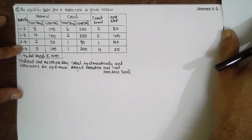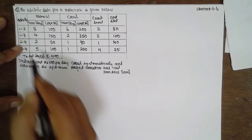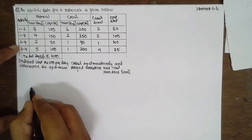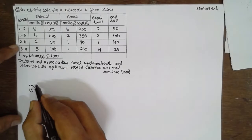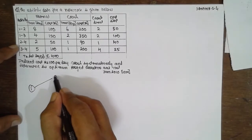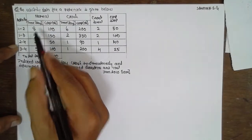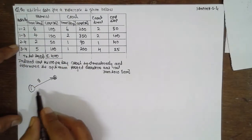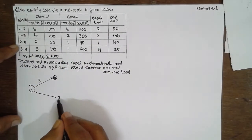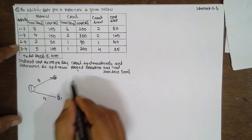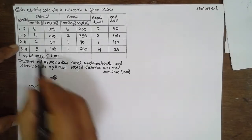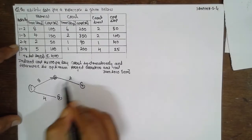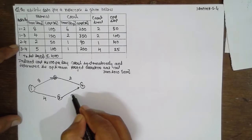Now we are going to draw the network diagram based on the activity. Activity 1 to 2, normal time is 8; 1 to 3, normal time is 4; 2 to 4, it is 2; 3 to 4, it is 5.